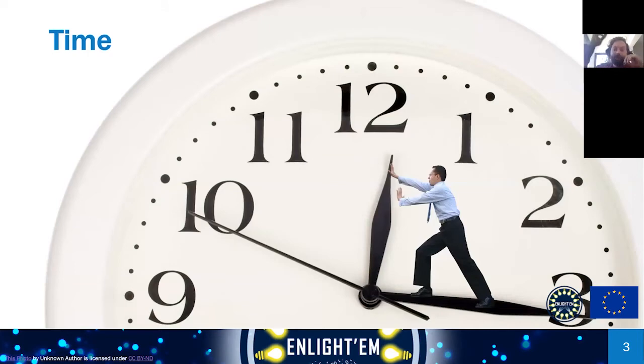So time is probably the most precious resource in a project, and needs to be very carefully managed. And usually that process happens at the project proposal stage, but it's also something that needs to be reviewed all of the time, because things don't always go to plan. And in fact, I think a good rule of thumb is to assume that things will not always go to plan. And when you do your initial project plan in terms of deadlines and how much time different steps will take, you always need to provision for extra time for things going wrong.